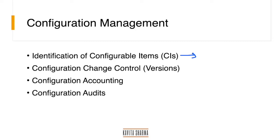The items like project plan—I need to be able to write, other people should be able to read. So this starts off with finding out what are those items which you really want to secure. We can begin with plans, all MOMs, code and so on. These become my CIs and the list goes on. Whatever you think, you want to write them.